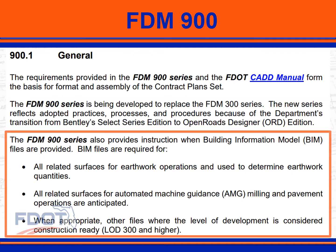Also new to this chapter is guidance on submittal of BIM files. Simply put, BIM files are a signed and sealed CAD file that can be 2D or 3D. A BIM file is another form of plans and is a contract document.